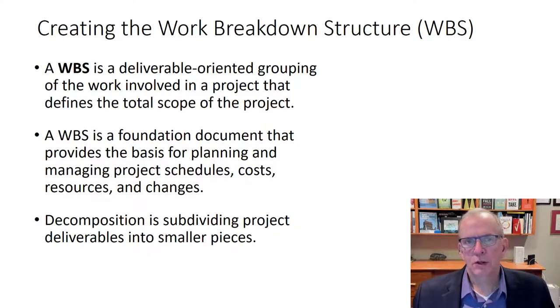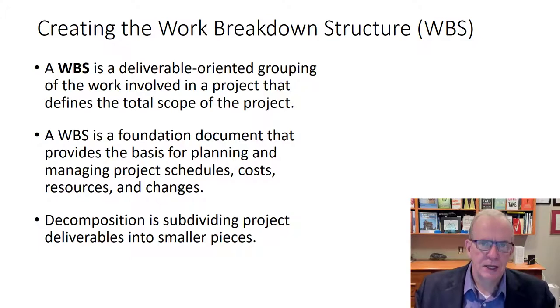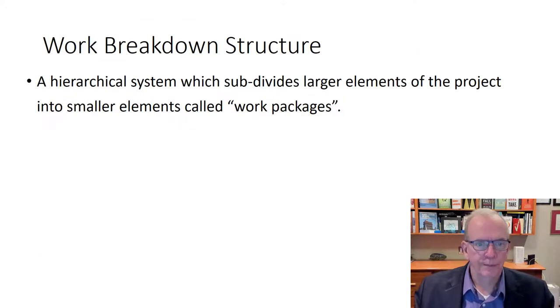But once you get into a little bit of complexity, it's hard to do that. So you want to break it into groupings and areas of work to ensure you don't miss anything in the process. And it's very helpful to standardize those areas or groupings for particular types of projects, so that everybody in your company has a process and flow to the work.